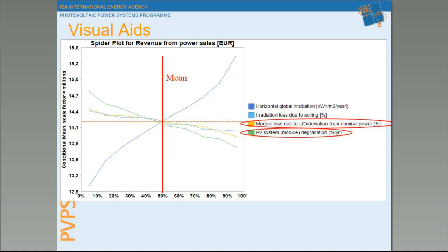This plot can be dangerous, however, because we ourselves choose the boundaries for the maximum and minimum values. The 0 to 100% range in this plot represents a delta that we have decided upon. It's not an objective range.